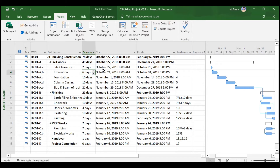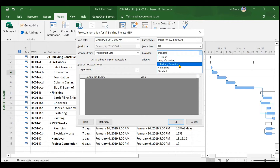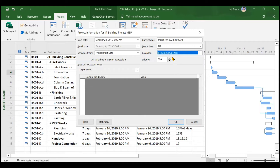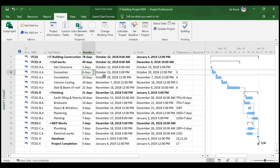Now we are in a position to change the project calendar. Go to Project Information and in the Calendar field, change it to IT Building Calendar, then click OK. You will see that not much has changed visually — only the timings have shifted, like from 8 a.m. it is now starting at 12 p.m. and so on, because it is calculating everything based on number of hours.